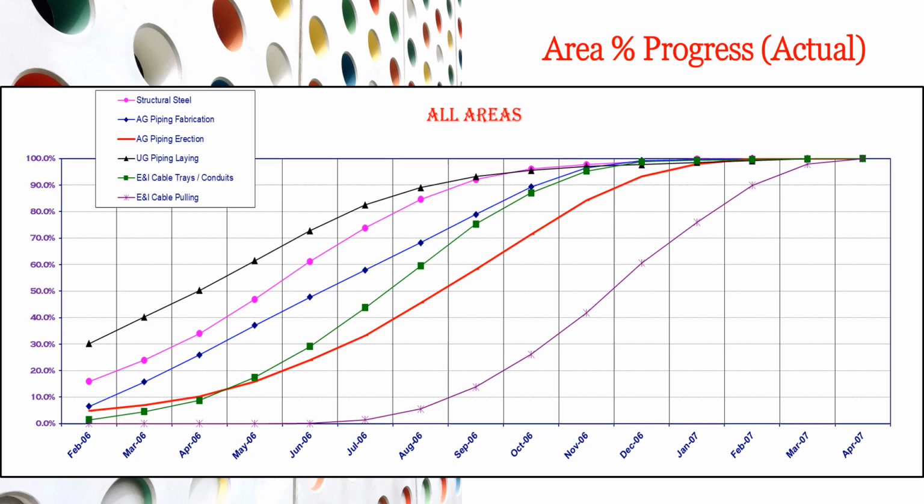The S-curves are graphical representations that depict the cumulative progression of a project over time, with an S shape that captures the typical pace at which a project advances: slow at the beginning, accelerating in the middle, and tapering off towards the end.